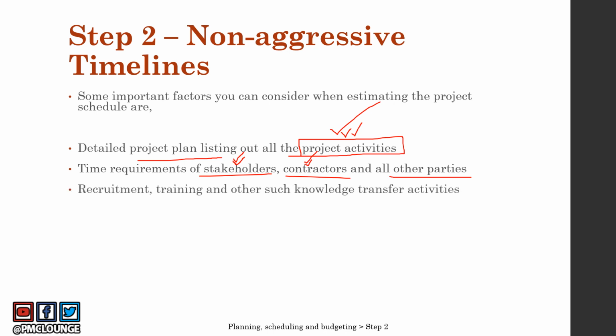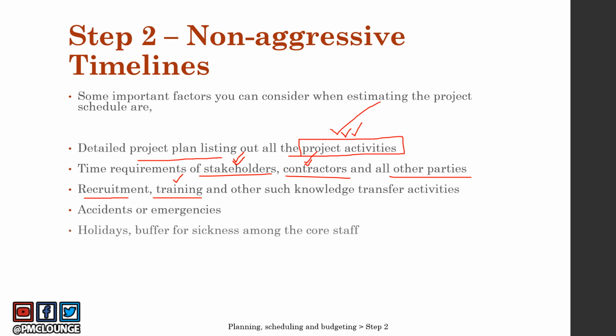Recruitment, training, and other such KT, knowledge transfer activities. If you need to recruit people, if you need to train them, you need to account for this time as well when you are coming up with your project schedule. Accidents or emergencies can happen at any time. You should have some buffer to manage accidents or emergencies.